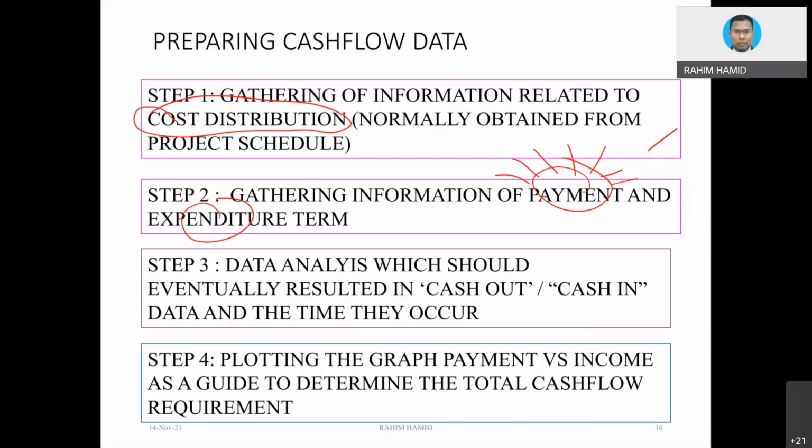You will get the money, not immediately, but it will take a long time. Okay. And one more thing about retention fund. Maybe you have heard about retention fund, which is normally equivalent to 5% of the value, okay, will be retained. Meaning to say, whatever amount that you claim, 5% will be deducted and will be put into retention fund, what we call